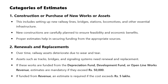Category 2: Renewals and Replacements. Over time, railway assets deteriorate due to wear and tear. Assets such as tracks, bridges, and signaling systems need renewal and replacement. If these works are funded from the Depreciation Fund, Development Fund, or Open Line Works revenue, estimates are mandatory if they exceed ₹50,000. If funded from revenue, an estimate is required if the cost exceeds ₹50,000.